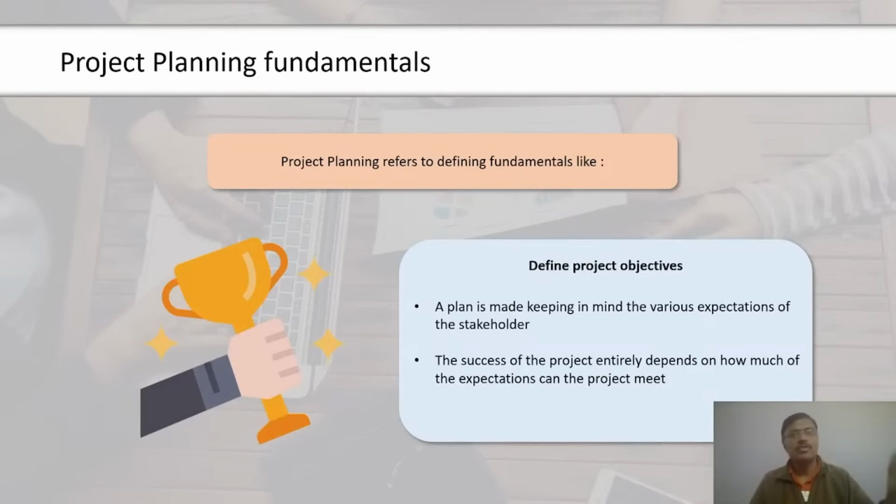In the next screen, let us look at a few important terms in time management. When a successor activity can start before the predecessor activity can complete, it is considered lead. For example, you can start preparing the test environment 2 weeks before the development activity finishes.